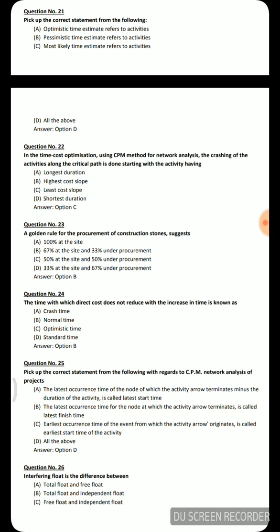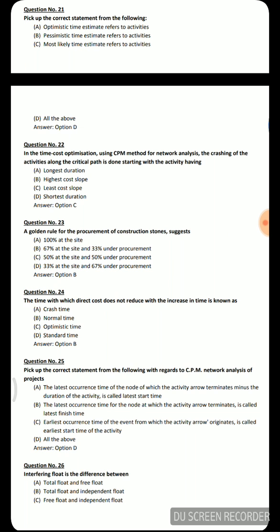Question 22: In the time-cost optimization using CPM method for network analysis, the crashing of activities along the critical path is done starting with the activity having — Option A: longest duration, Option B: highest cost slope, Option C: least cost slope, Option D: shortest duration. For optimization we start with the least cost slope, so option C is the correct answer.